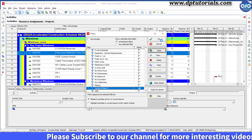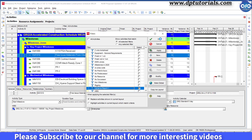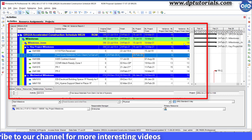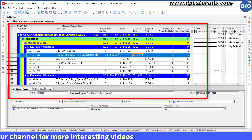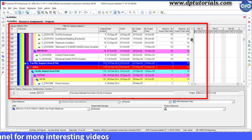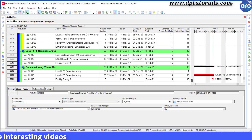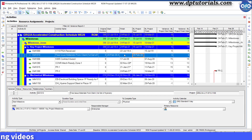Now, selecting this filter, click on Apply to view all those activities that have slipped from their baseline start or baseline finish date.